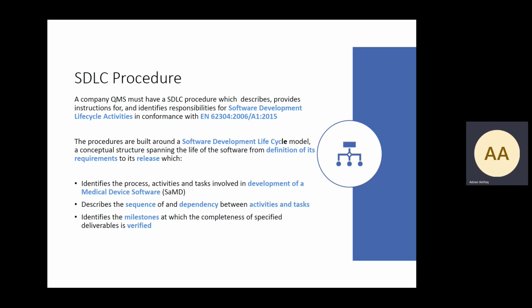These procedures are built around the software development lifecycle model, a conceptual structure spanning the life of the software from definition of its requirements to its release, which firstly identifies the processes, the activities, and the tasks involved in the development of the medical device software. It describes the sequence of and the dependency between activities and tasks. It identifies the milestones at which completeness of specified deliverables is verified.